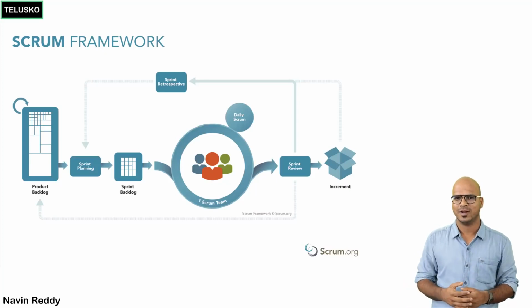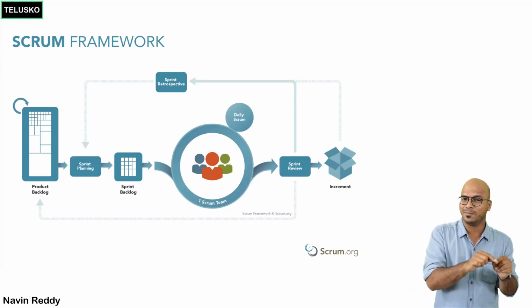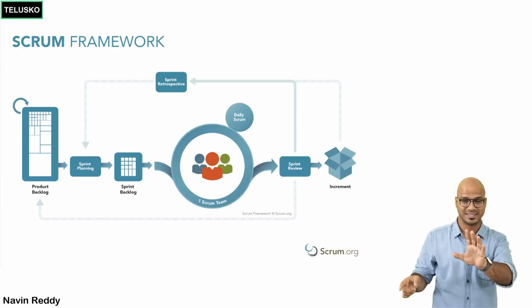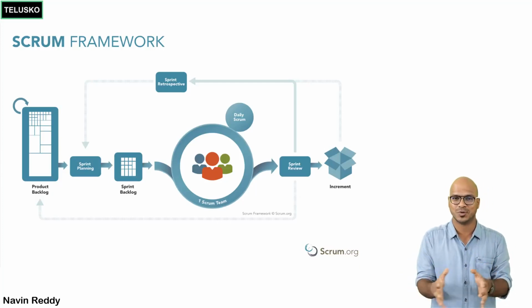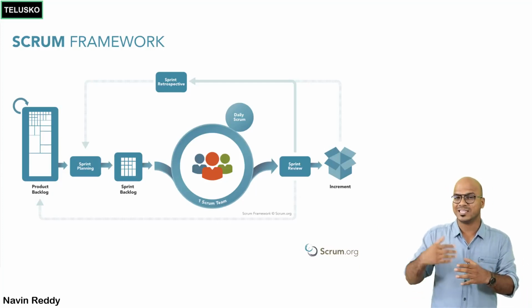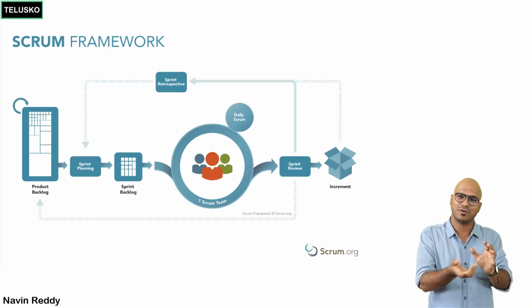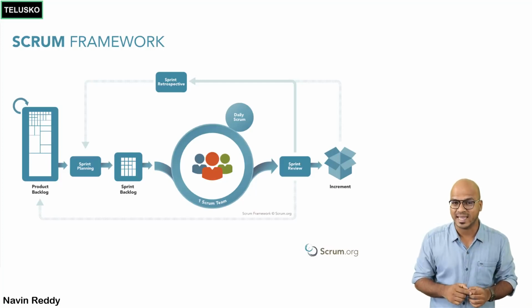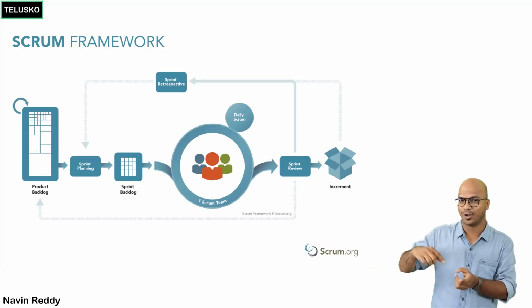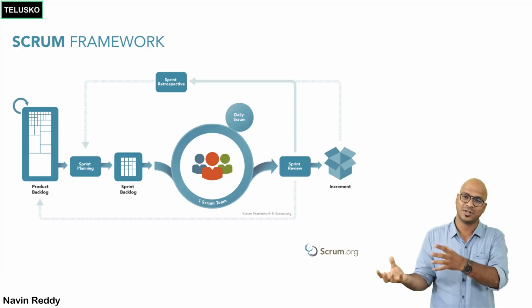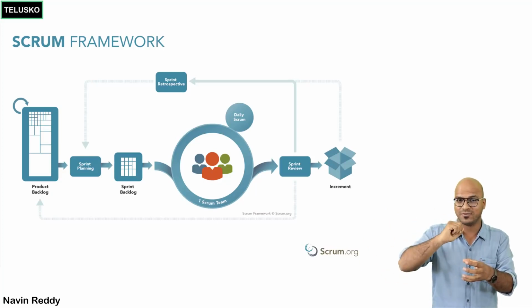But it may happen that in your first sprint, you were not able to complete all the sprint backlog. Now what will you do? You will send the remaining backlog to the next sprint. Yes, that is possible, okay? There is no hard and fast rule that you have to complete that. Of course, in the next sprint, you will complete the backlog from the last sprint, and you will take some extra from the product backlog, right? Of course, you have to break it down. You have to take it in the current sprint. You have to plan first, right?